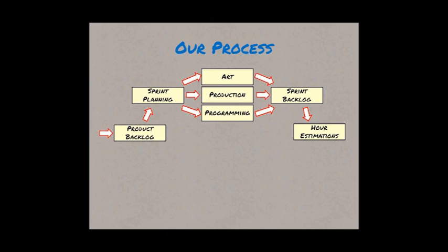So that was the basis on which we planned everyone's sprints, where we'd try to plan 20 hours for everybody. The downside to that is because our mechanics were so strange to implement, especially the Infinispecs, we'd have these gargantuan tasks that we have no idea how long it's going to take to do. And then on occasion, we found that, if we already had all the features that we wanted for the sprint, people were already committed to working on those.